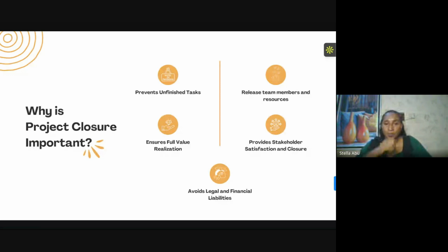So imagine that you're building a house for someone, and when you're trying to close that project, you have to look at it again. What have we done? Are we done with the painting? How does the ceiling look? Okay, the doors, this person said they need 3, 4, 5 doors. Okay, are we done? What are the things you're supposed to deliver? At that point, you're checking all of the things you built for that project, before you hand it over